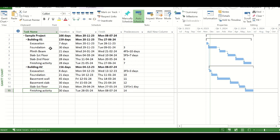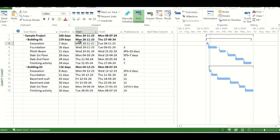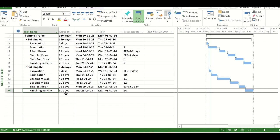Now if we talk about including the project manager for this project, then the project manager will be in this project starting from first task in this project, that is the excavation of building 1. This is this task and he will stay in this project till the end of the building 2, that is the finishing activity of building 2. So the duration of the project manager in a project will depend on the start date of one activity and end date of another activity. So in this case, we can include a hammock task.